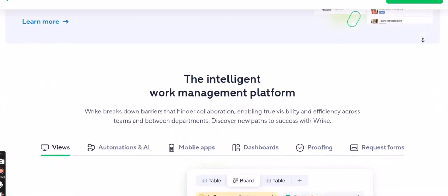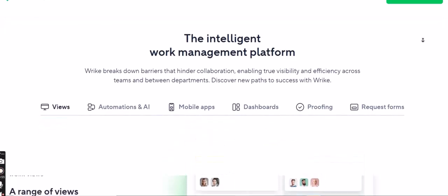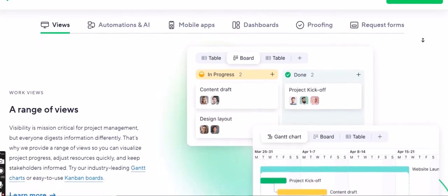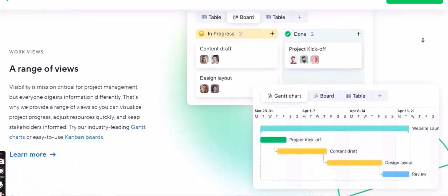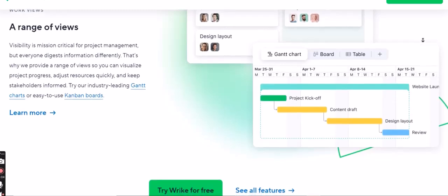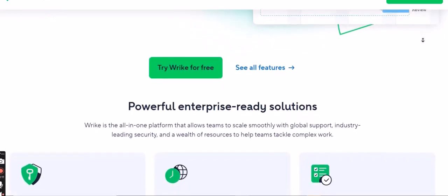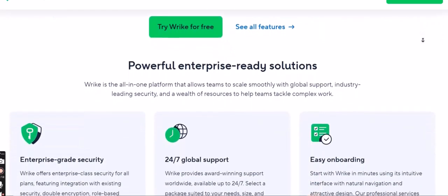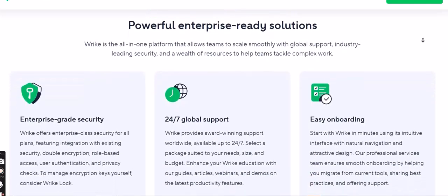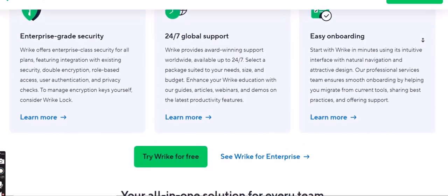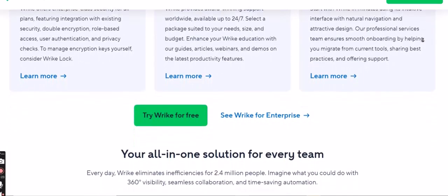Custom. Wrike also allows for more granular custom permissions, enabling you to fine-tune exactly what actions a user can perform within the project. Carefully consider the role of each individual or group and assign the appropriate permission level. Overgranting access can lead to unintended modifications, while insufficient access can hinder collaboration. Add a message. Optional but recommended. You can include a personalized message to the users you are sharing the project with. This helps provide context and explains why they are being granted access.